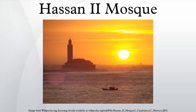The concrete used for the minaret was a special high-grade type, which could perform well under severe conditions of a combined action of strong wind and seismicity. This was achieved by the science department of the Bouygues Group, the contractors for the project, who developed an extra-strength concrete 4 times stronger than ordinary concrete. Called BHP, it offers a resistance to compression value of 1,200 bars per square centimeter and has a very quick setting time. This enabled the building of a taller structure with due underpinning of the foundation, while adhering to the construction schedule. Cranes were also designed to suit the height of the minaret for concreting.